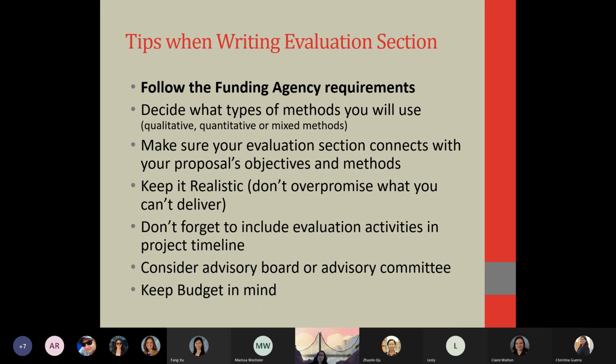Don't forget to include, I see this so often, and that's why I included this here: do not forget to include your evaluation activities in your project timeline. Not every grant is going to ask for a project timeline, but I say the majority do. Sometimes it's in the evaluation section, but more often I see it in the project management section. Yet I noticed that faculty or PIs do not include their evaluation activities within the timeline. That's so important. They need to know what you're going to collect, when you're going to collect it, when you're going to analyze it, and when you're going to present the results. So that's just another thought I had.